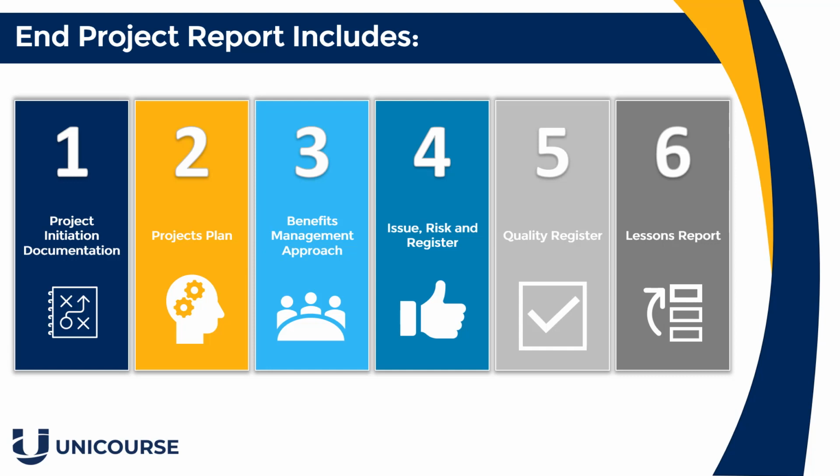It's usually created at the end during the project closure process. But again, if the lessons learned are monitored throughout, and ways to resolve problems such as regular issues or risks or quality are added in there throughout, it will take less to conduct the project closure.